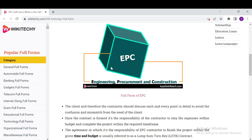EPC stands for Engineering, Procurement, and Construction. It is a common form of contract in the construction industry. The contract is formed between the contractor and the client, and it covers all details about the development project — like designs of the project, procurement of materials, and the labor and equipment required.